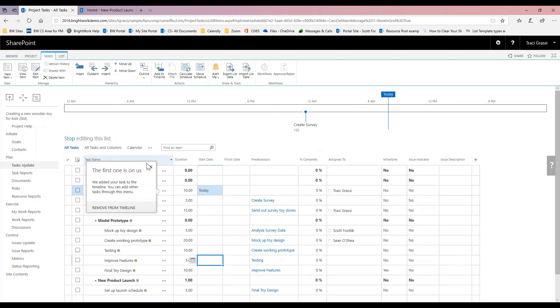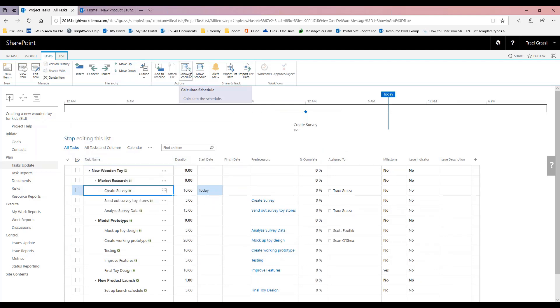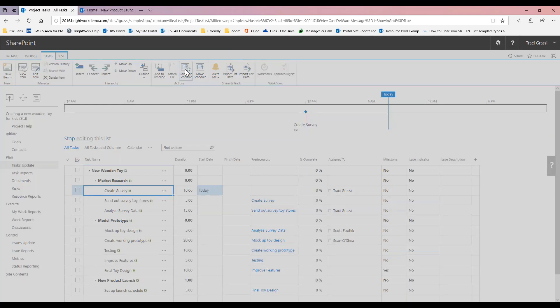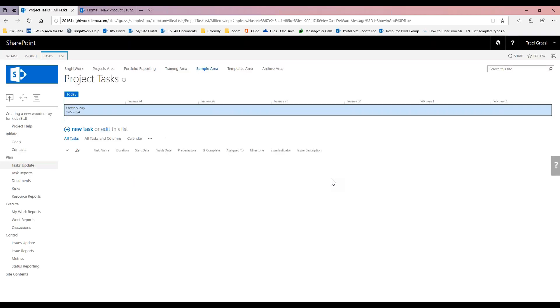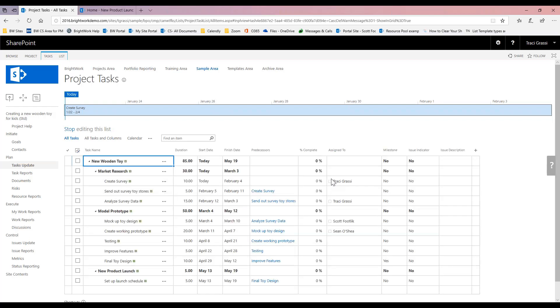Now I want it to go ahead and calculate my schedule for me. Here I'm going to come up in my tasks toolbar again and I'm just going to say calculate schedule. What this is going to do for me now is it's going to take my durations, my predecessors into account, and it's actually going to waterfall that schedule for me just like Microsoft Project would. It makes it very convenient. I don't have to figure out what 15 days from now is or how the whole thing works. It's just going to go ahead and do that for me.